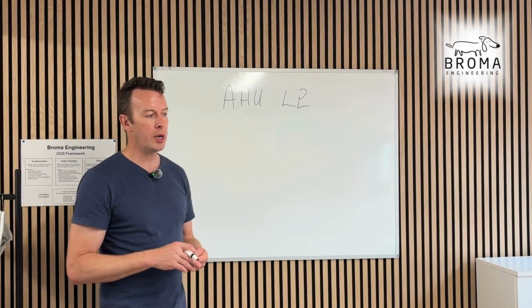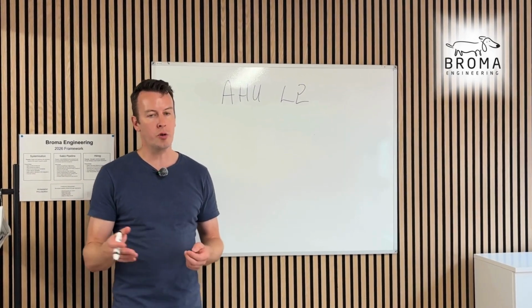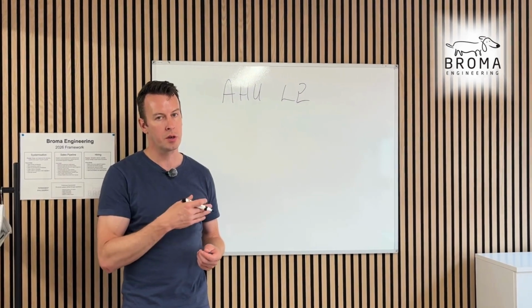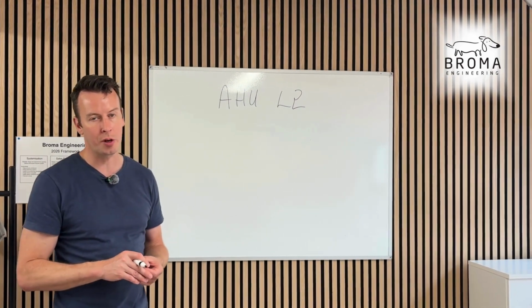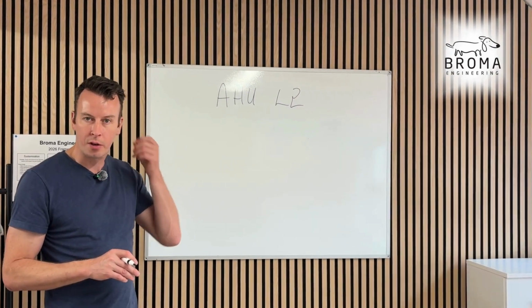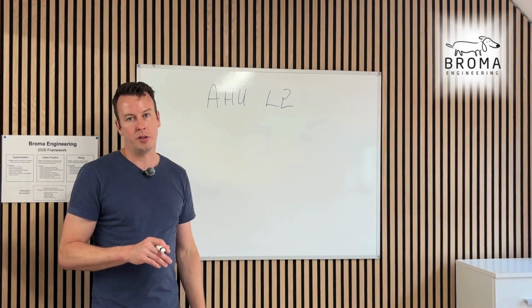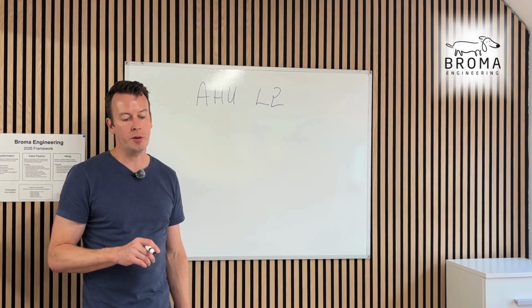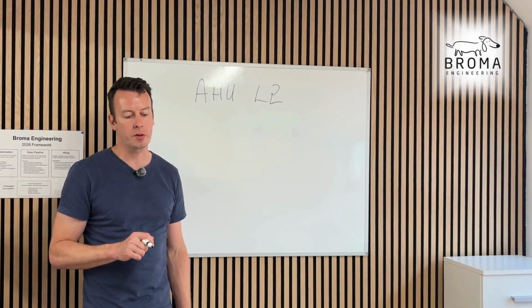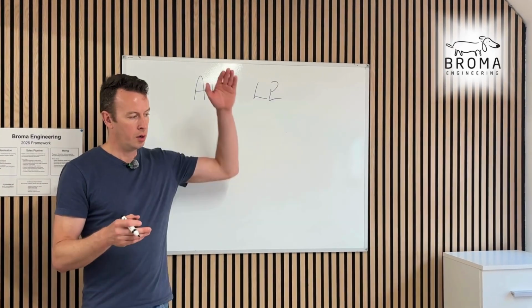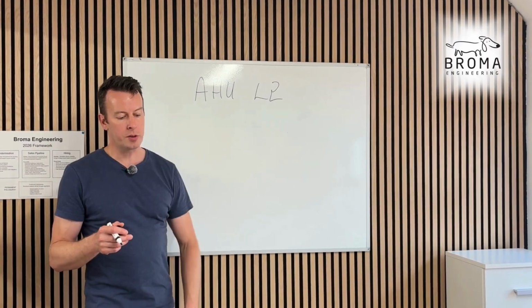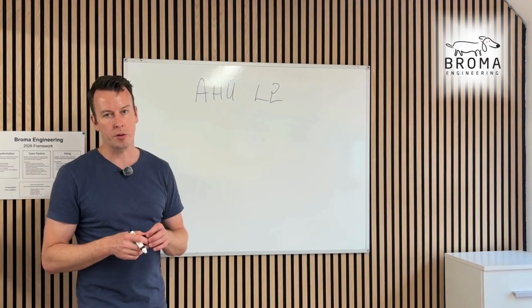But if they're standardized global check sheets, make sure that anything that is not applicable is discussed well in advance of the night before we turn it on. That we're not having a fight over, is this not applicable or is it? So we've listed out in maybe even an RFI, or we've talked to all stakeholders, item number 1.6 is not applicable. We've listed them out and this is why, and we've gone through it beforehand.